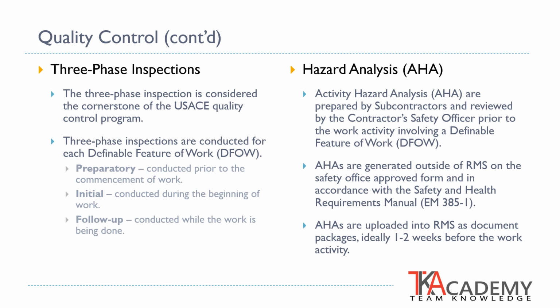AHAs are generated and uploaded into RMS as document packages, ideally 1 to 2 weeks before the work activity. A hazard analysis is often discussed and briefed during the preparatory and initial inspections.